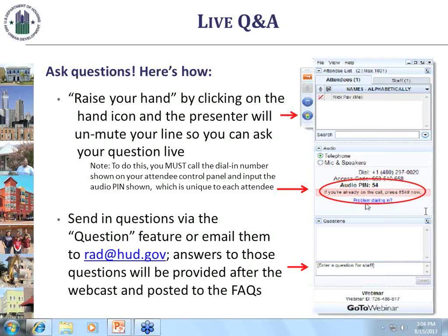if there's a large demand for family units in the place, or if it looks as if there's some racial basis behind the decision or something. But other than that, there's nothing that says you can't change the bedroom distributions. So yes, you could do that. And you need to figure out the replacement: what are you going to do with those families? Families that have to go somewhere won't be going in the RAD property. Right, if those 100 units are occupied today, then you have to give them a place to live in the new site, or they have to voluntarily agree not to come back to the new site.